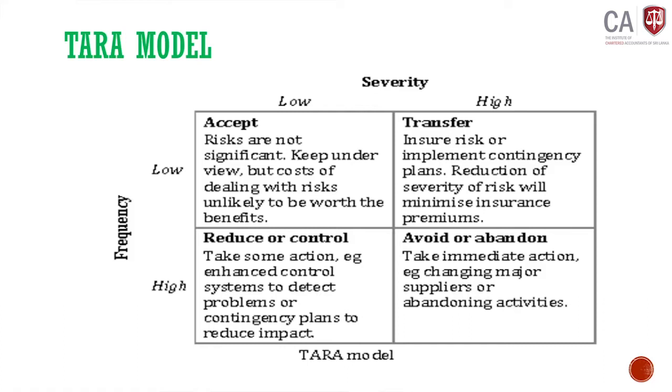We have paid a premium on that. Therefore, the insurance company will reimburse the cost of repairing. Therefore, we can transfer our risk to a third party. Okay. If the severity is high but frequency is low, you have to transfer your risk to a third party. Transfer.